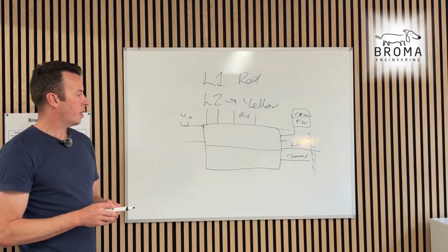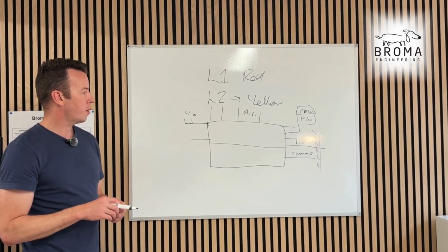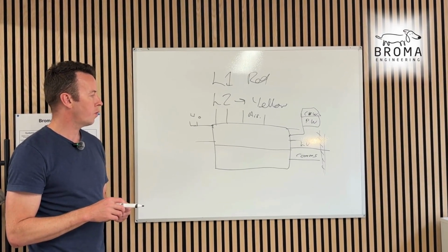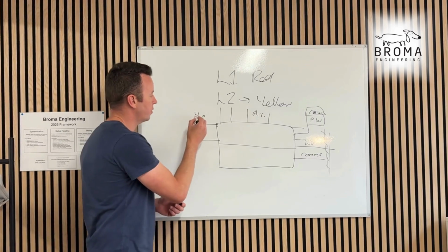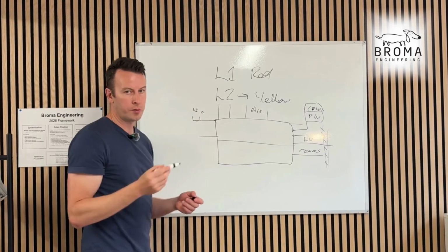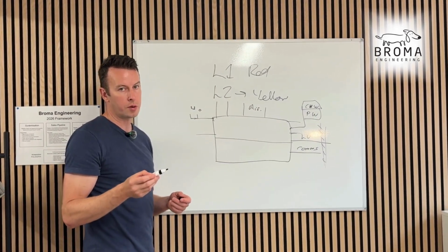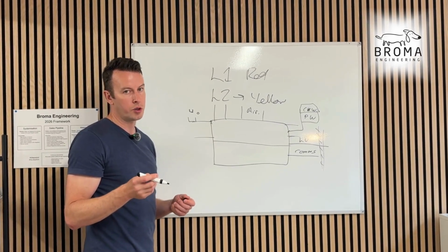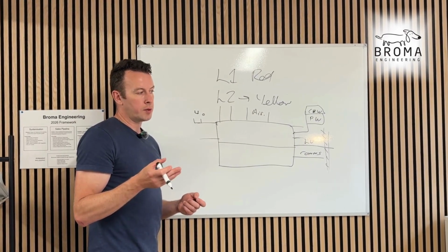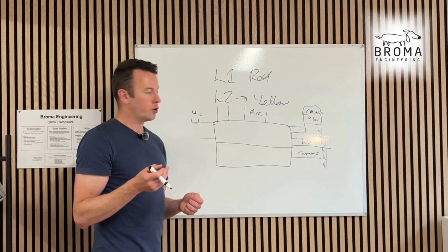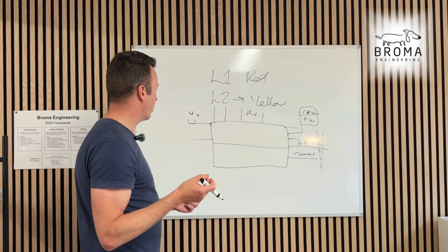So planning this, talk to your teams, make sure that we know what's going on, what needs to be laid down, who's going in first. High level stuff should be going in first, and that should be reflected in the schedule. And every morning, the DABS meeting, we should know that. If meetings have started already, the daily commissioning meeting, then we should know what's going on in here as well.